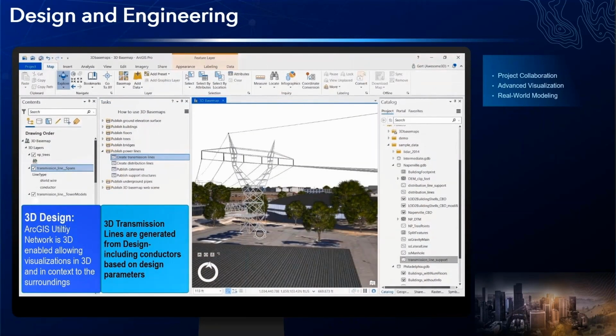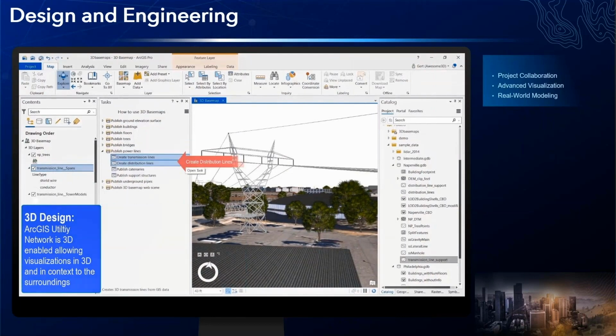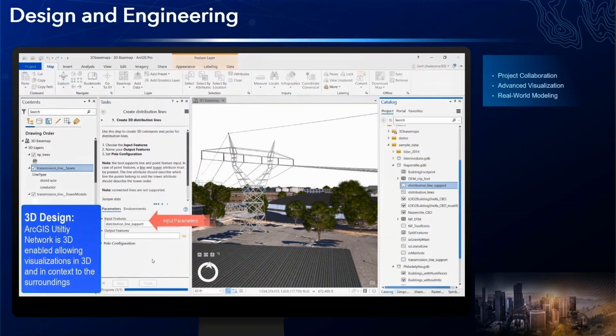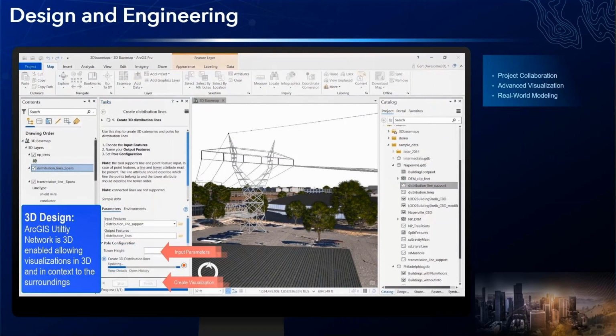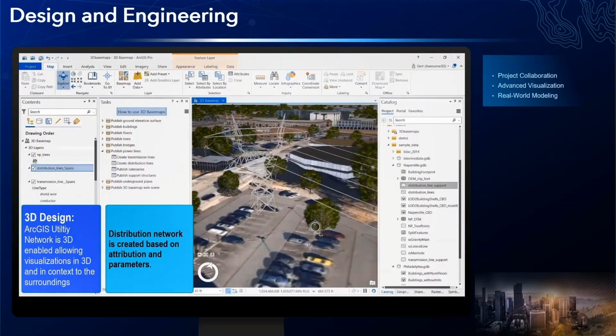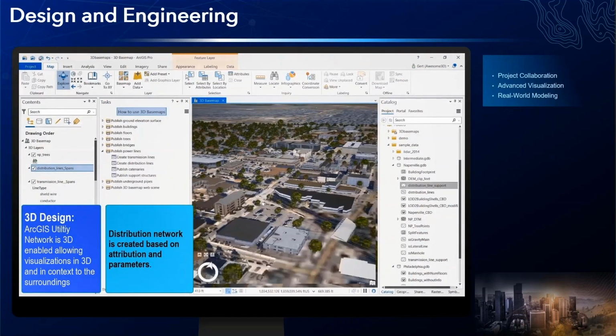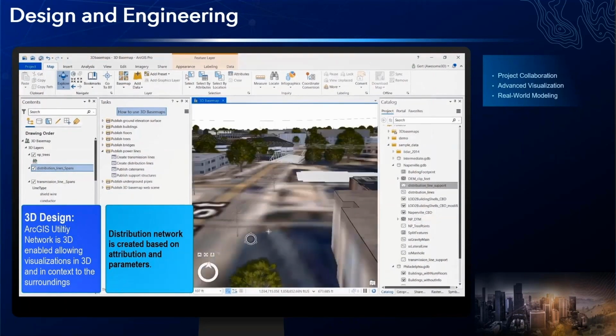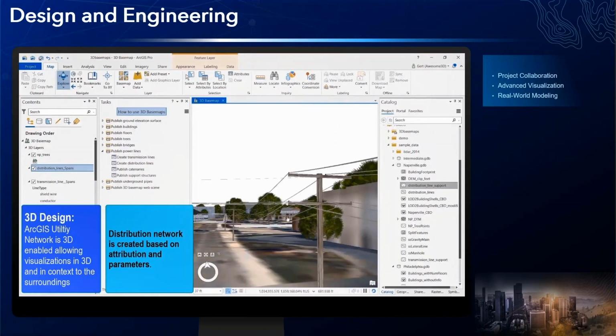Now, well before the design process begins, utilities can bring those designs to the public. Altering these designs in the early stages is a simple matter. But after detailed design, changes can be costly. Aside from the community engagement, the 3D views provide engineers analytics on factors such as river crossings and clearances.